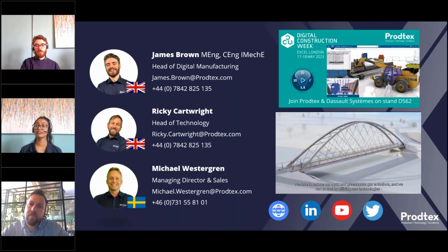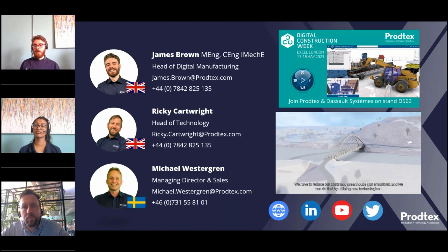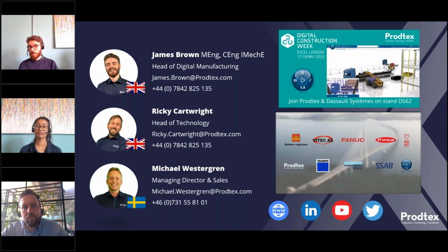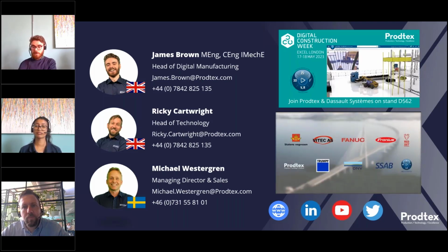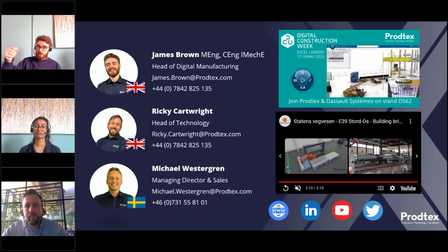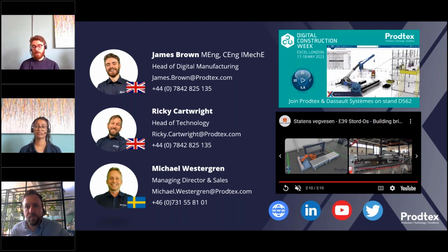But exactly like I think this question is alluding to, you might not always have that, especially if this is a new product. It might be too expensive to build a physical demonstrator, or you're early in the R&D of this prefab product to go away and get funding to do that. So yeah, through the simulation, you could get times out. So for the workers, you could literally simulate someone reaching and doing something, and then we get the time output of how long it takes them to walk over somewhere, pick something up. Of course, this is just an estimate, a simulated time. You should always replace that with the measured when you have it. But yes, you could do that.